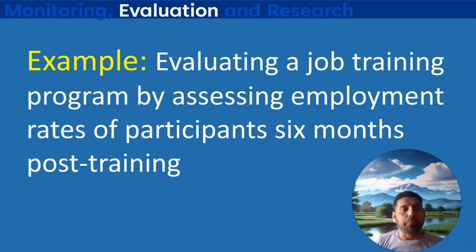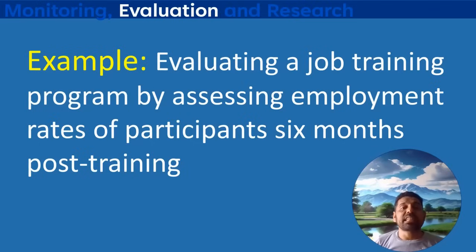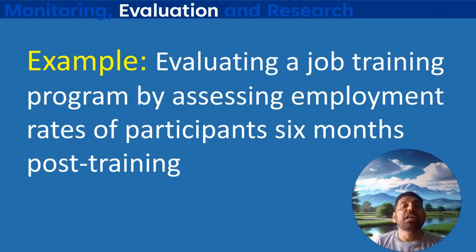For example, consider a job training program — an evaluation might look at the employment rates of participants six months after completing the training to assess whether the training was effective in improving their job prospects. Similarly, for any intervention being monitored and tracked, evaluation determines whether the intervention was relevant, efficient, effective, impactful, and sustainable.